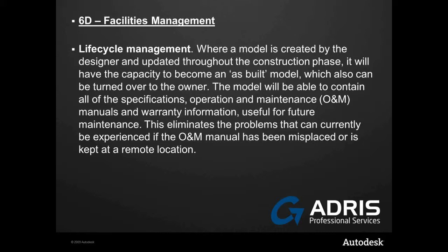So Autodesk produce what's called a COBie toolkit. This is a piece of software that will automatically produce equipment lists, product data sheets, warranty information, and maintenance data in an easy to understand format. It will be a spreadsheet.